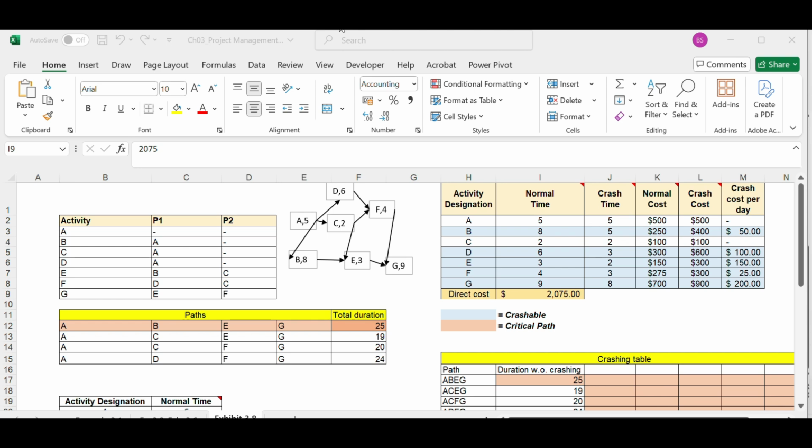So, do we have a solution for the resourcing challenges? Yes, one solution is to design a buffer feeding or a feeding buffer. We can include a resource buffer and a time buffer. We need to make sure that the resource requirement does not exceed resource availability. Resource overload can happen because of either an adequacy challenge or an availability challenge.